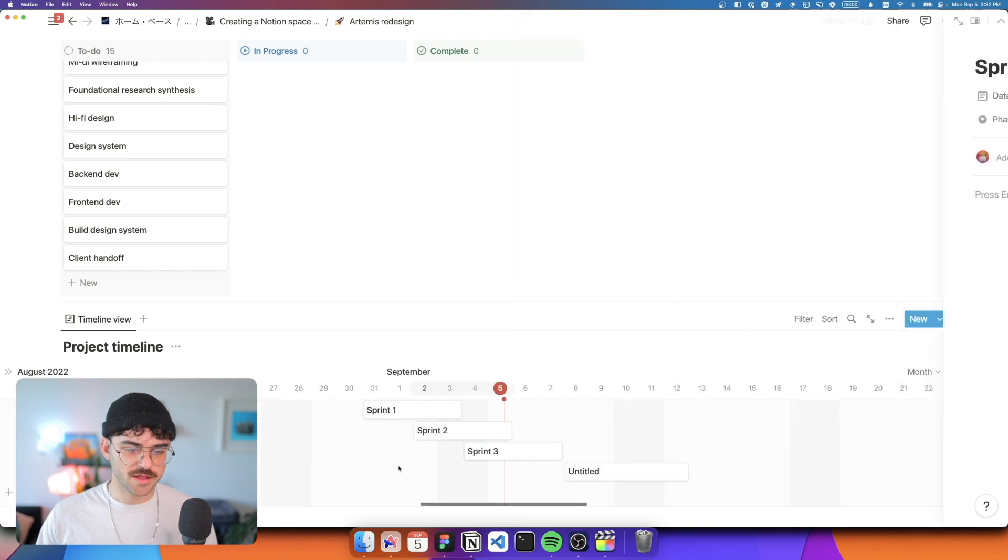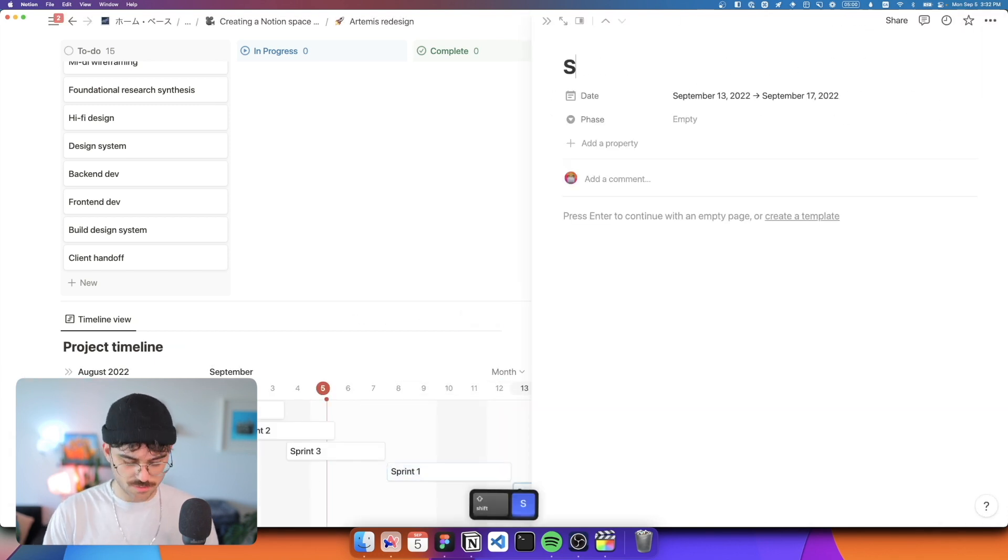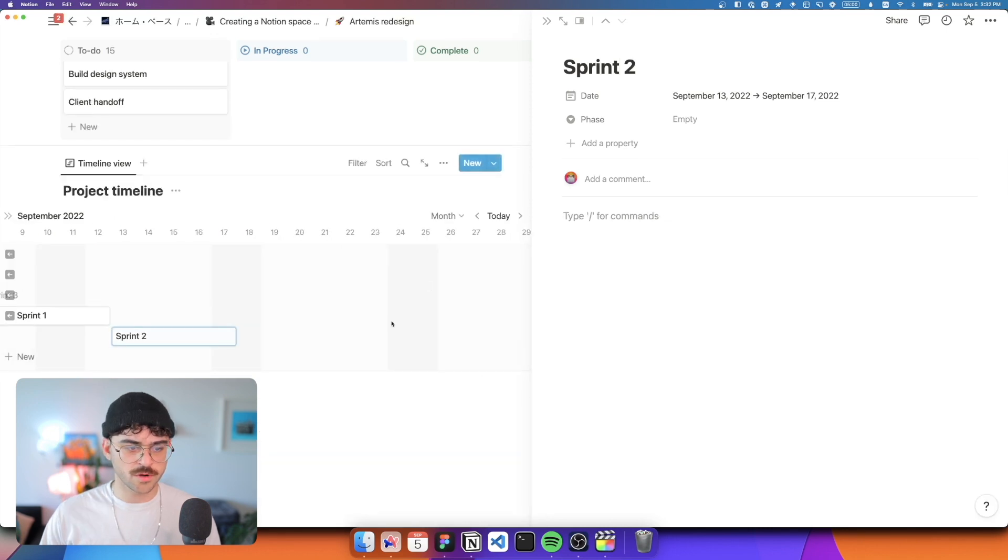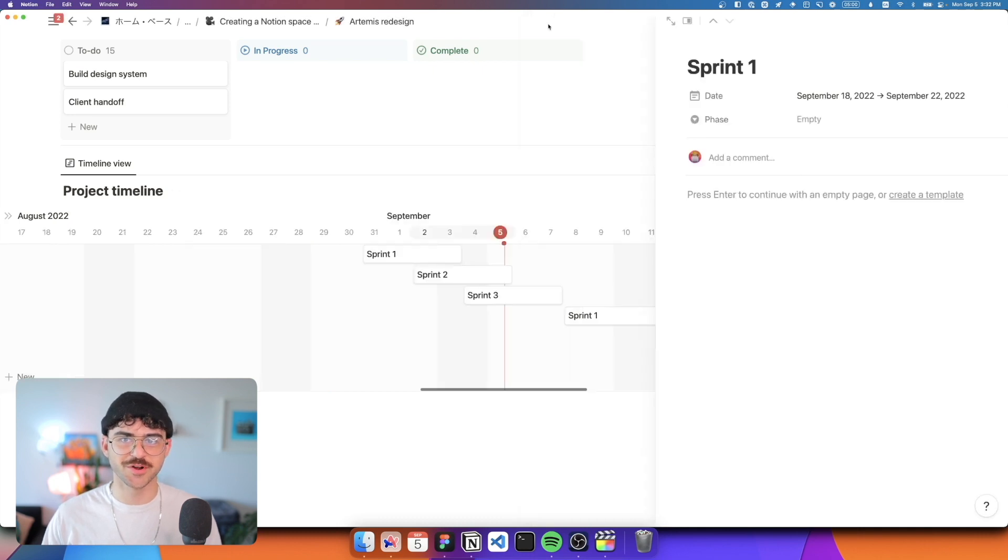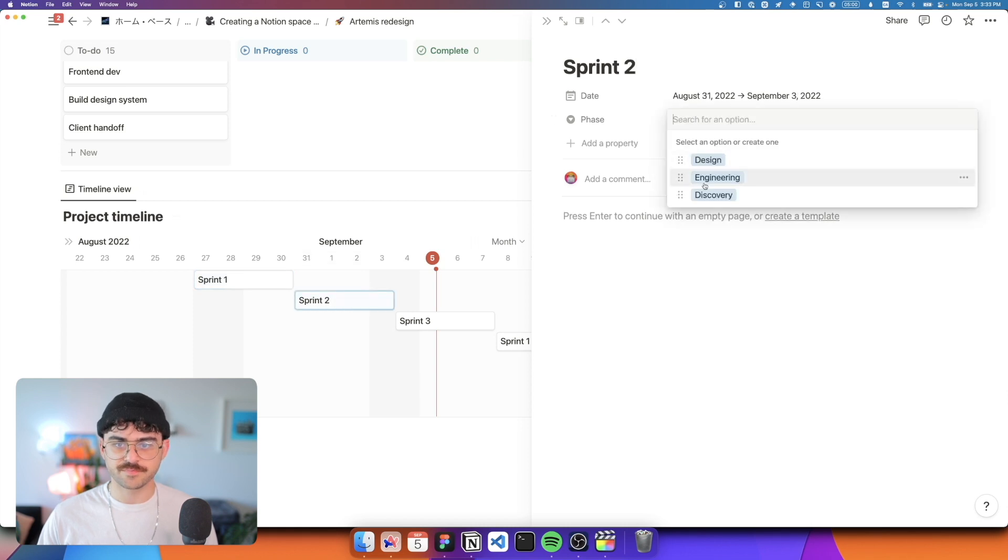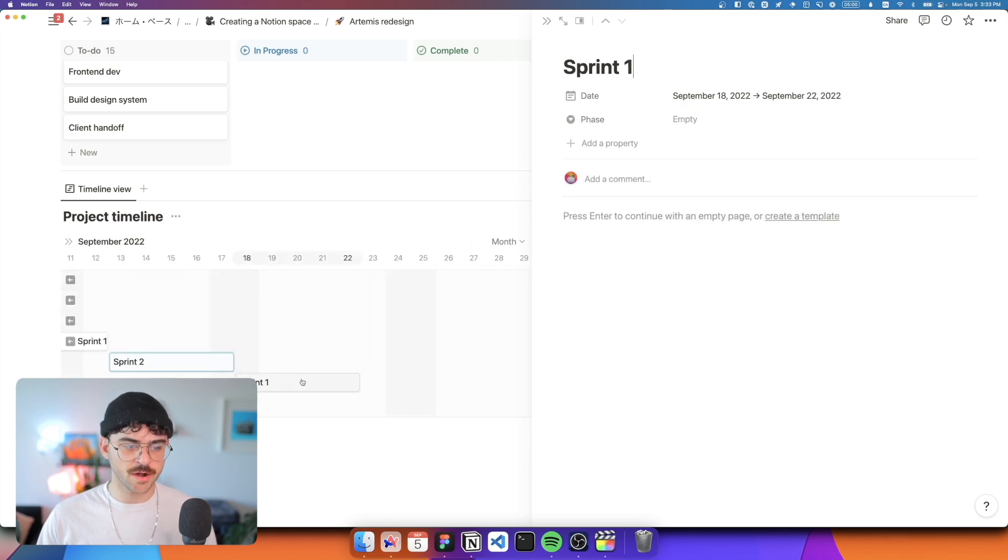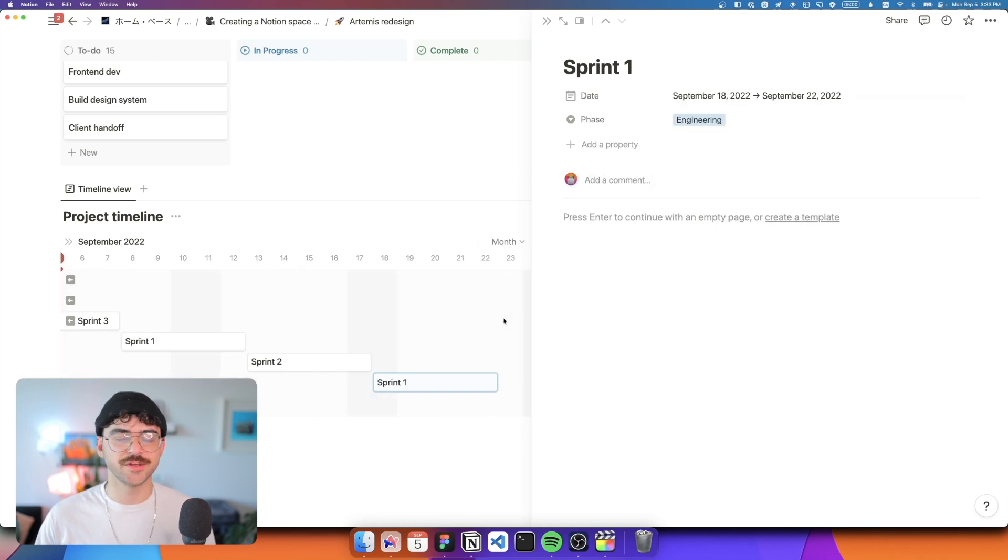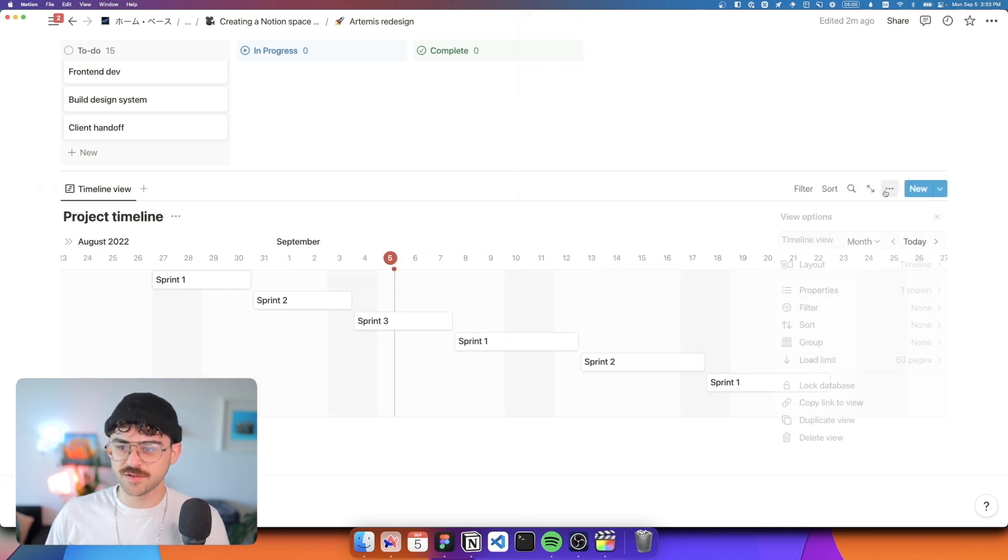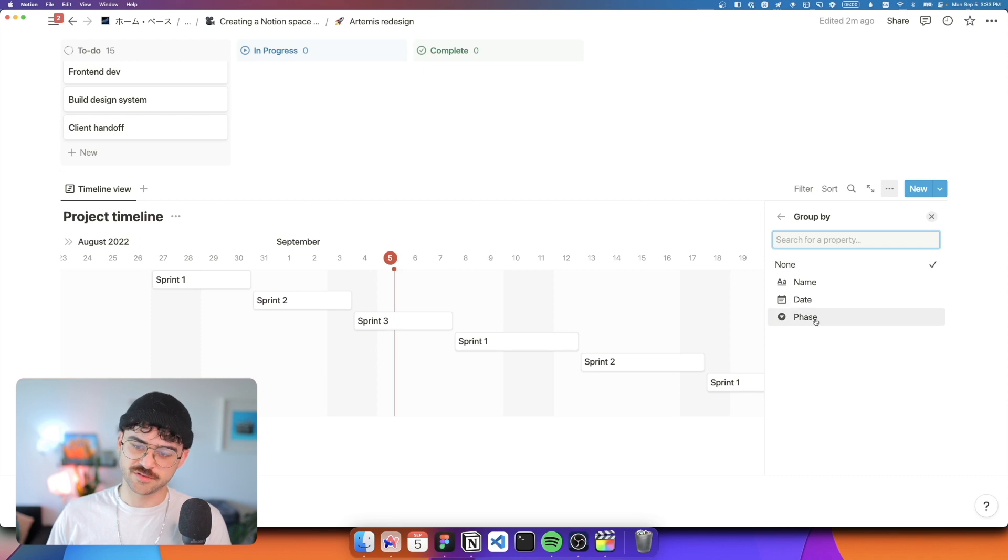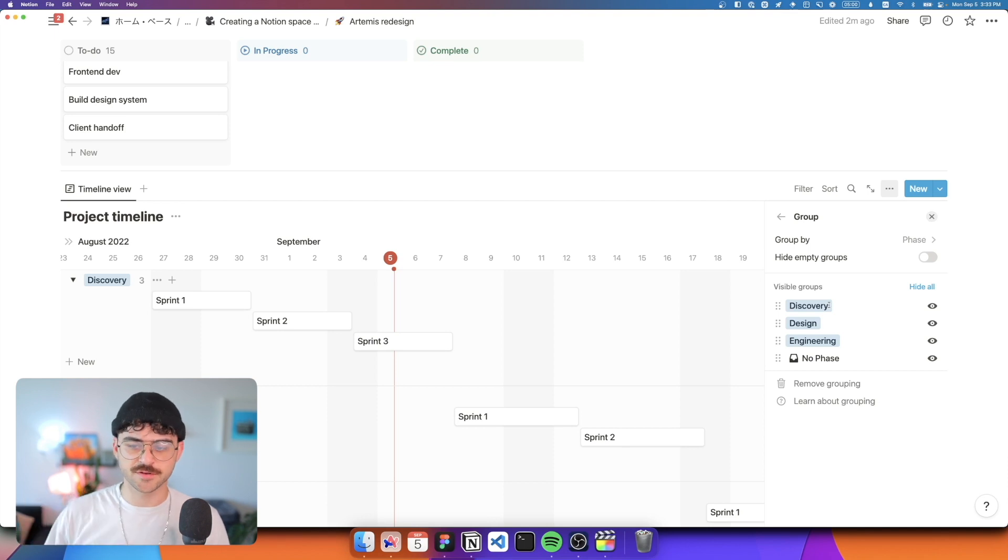And then what you can do is add some more stuff. So let's go ahead and add another sprint one, another sprint two, we'll do one more sprint one, just for good measure, it's going to be our engineering sprint. There's never been a single sprint of engineering in a project ever. So now we have our three discovery sprints, our two design sprints, and then our one engineering sprint, unheard of, absolutely the most 10x engineers you've ever seen. And the reason I split those up into various phases is because now I can go in here, and I can group these sprints by phase, and then I can sort them based on the actual order. So you'll start with discovery, go into design, and then into engineering.